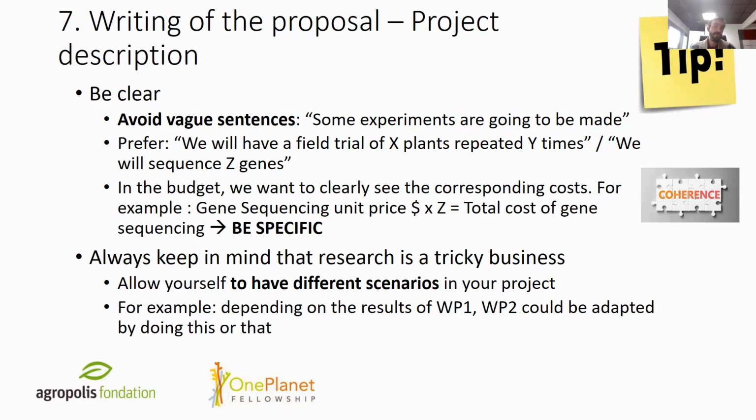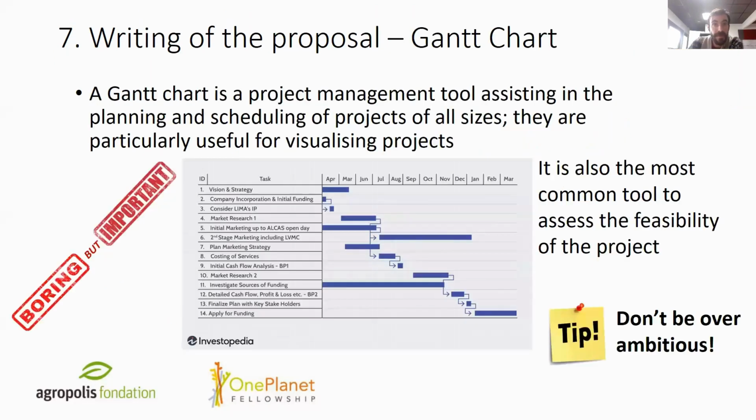But you have some researchers say, yeah, it should work so we can run the whole project. And you have another person who will write the same proposal, but say, okay, depending on the results of the first work package, we may adapt the rest of the project to reach different objectives. So really, it's completely possible, and it's always appreciated by the evaluators.